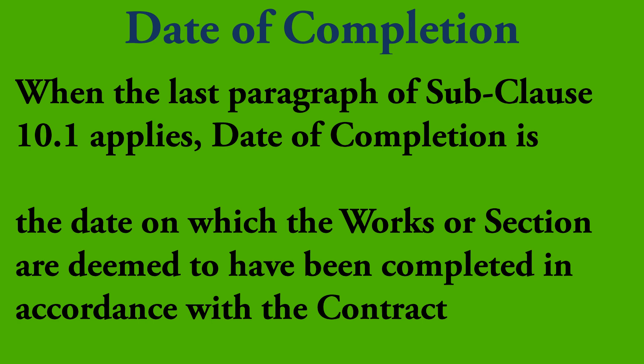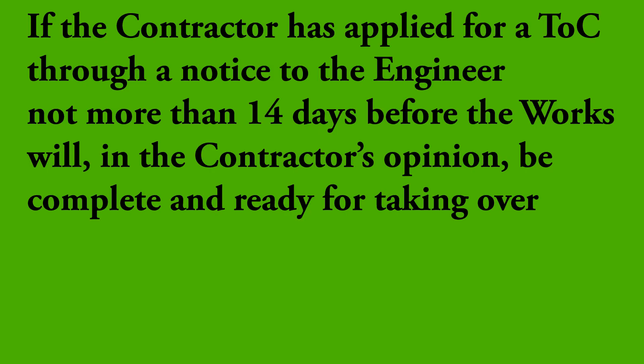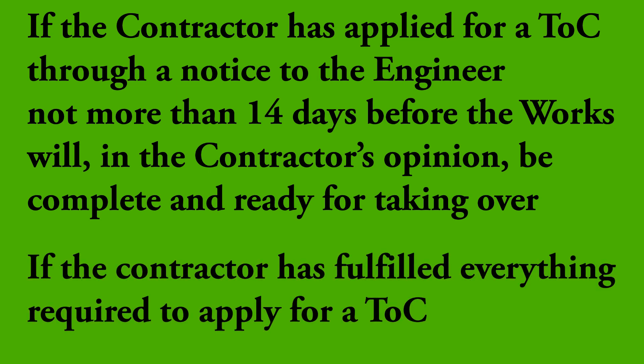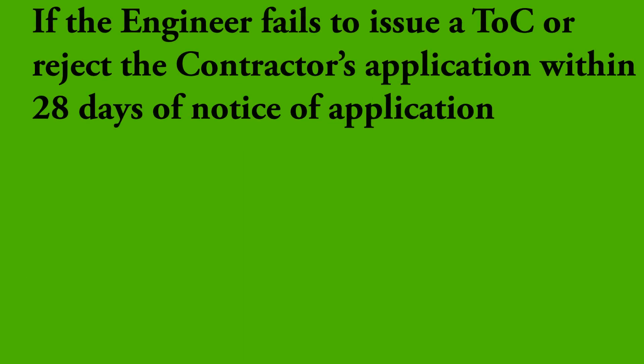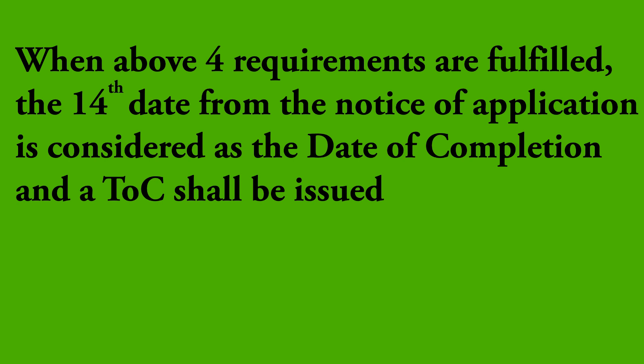Looking at the last paragraph of sub-clause 10.1: if the engineer does not issue the Taking Over Certificate or reject the contractor's application within 28 days, and if the conditions described in sub-paragraphs A to D have been fulfilled, the works or section shall be deemed to have been completed on the 14th day after the engineer receives the contractor's notice of application, and the TOC shall be deemed to have been issued. In simple terms, if the contractor applied for a TOC, fulfilled all requirements, the engineer fails to issue or reject within 28 days, and the works are completed by the 14th day after the engineer receives the notice, then that 14th day shall be the Date of Completion and a TOC shall be deemed issued.